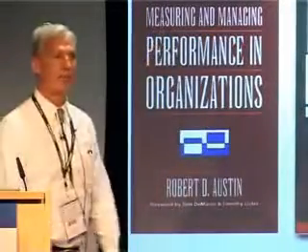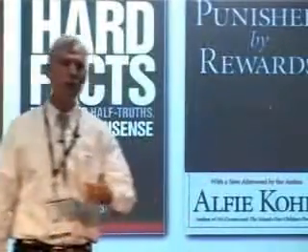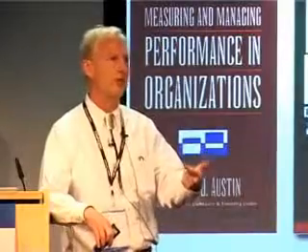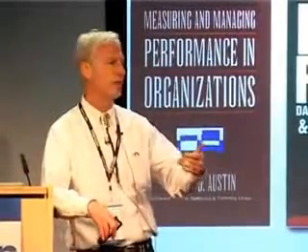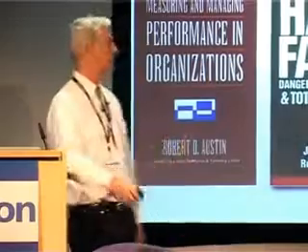Avoid all forms of incentives and penalties in the contract. Now, I don't mean that absolutely. If your partner completely messes up and runs off with the money, or steals your IP, it's time for penalties. But I'm just talking about the day-to-day penalties and incentives related to performance. Avoid any form of that, because surely if you studied books like Measuring and Managing Performance in Organizations, Hard Facts on Evidence-Based Management, Punished by Rewards, you'll know that all that happens when you introduce any form of performance-based incentive or bonus is that you simply create dysfunction, gaming of the system, a reduction in transparency, and a weakening of the system. Good things don't come from performance-based incentives and bonuses. All that you get is various kinds of dysfunction.